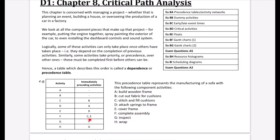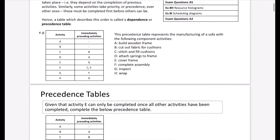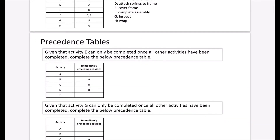G is to inspect the sofa, but you can only inspect it once it's been completed. Our final step H is to wrap the sofa so it's ready for delivery. This is a pretty simple example just to show the kind of headings you'd look for. If there are dashes, it means that activity can start immediately without depending on anything else.